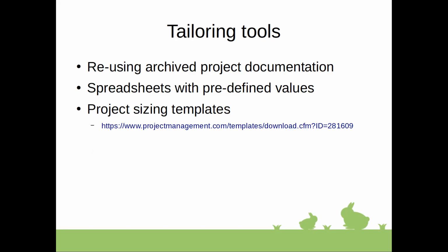It just needs to be done with a clear head, knowing that it's not a copy-paste process. It's a reusage of certain things that were done previously in the past. A very common tool is spreadsheets like Excel, where you can have certain sizing options matched to certain value formulas, where you can define how many people you need, project team size, what kind of budget you need, the costs of overall delivery.